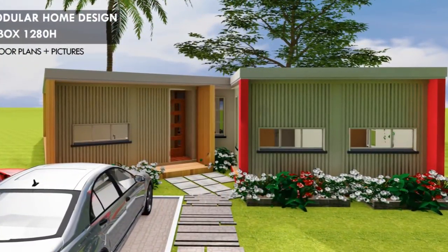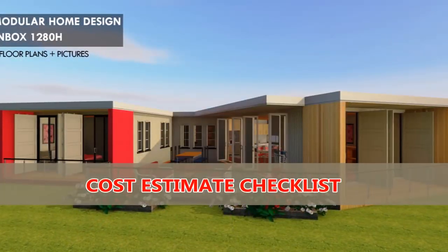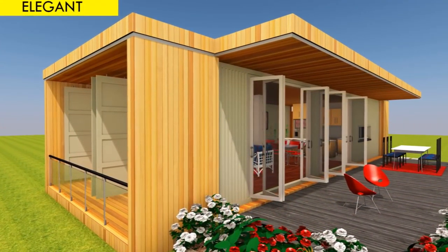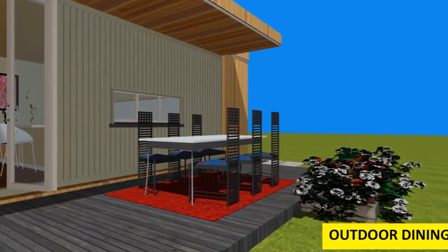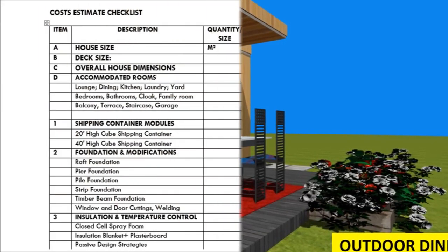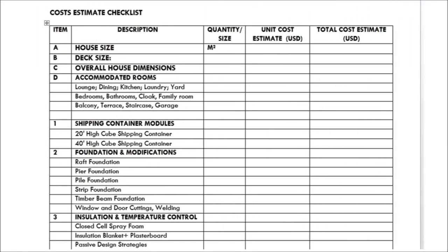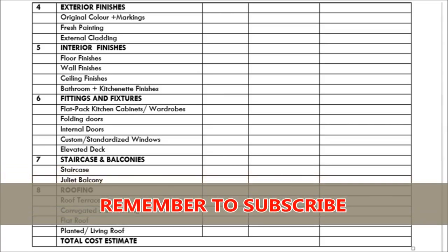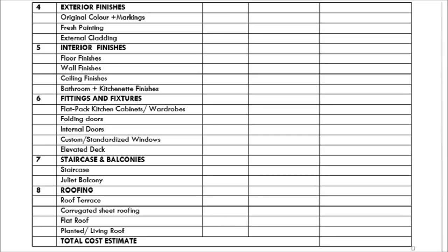The cost estimate checklist: the Inbox 1280H comes with a cost estimate checklist — an itemized list to guide you on the things to consider when planning your own shipping container project. The design inclusions in this list are: the house size, the deck size, the overall house dimensions, the accommodation list, the number of shipping container modules used, the type of foundation and modifications, insulation and temperature control strategies, exterior finishes, interior finishes, fittings and fixtures, a staircase and any balconies if present, and last but not least, the roofing type to use.